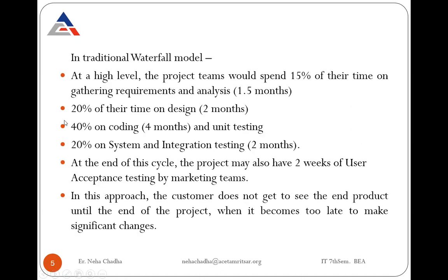If we consider this problem under the waterfall methodology, then at the high level, the project team would spend 15% of their time on requirement gathering and analysis. As we know, the first phase of waterfall methodology is requirement gathering. In requirement gathering and analysis, a team spends 1.5 months, 20% of their time on design, that is approximately 2 months.